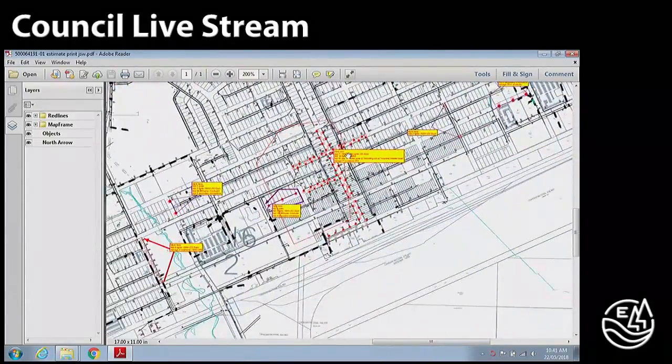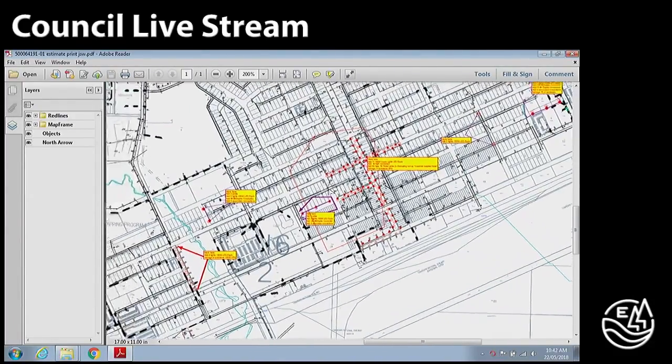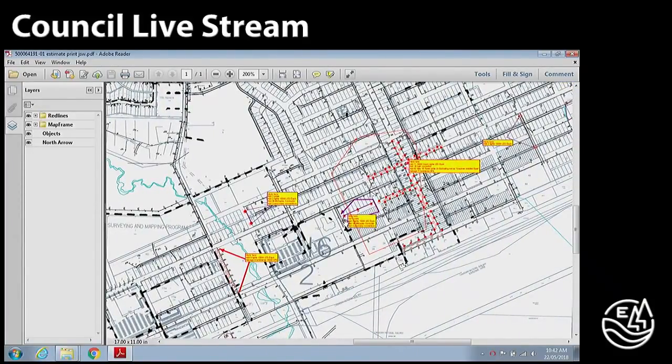On Main Street here, these are the decorative lights that are not compatible with their program of replacing or converting to LED. Therefore, the cost will include replacing all these decorative poles, not just the lights. Other decorative lights, for example, as you know, we have by the museum or by 49th Street between, I think, 6th to 9th Ave. All those will be able to carry the LED without having to replace the poles. But this particular one on Main Street needs both, replacing the poles and also fitting them with LED lights.